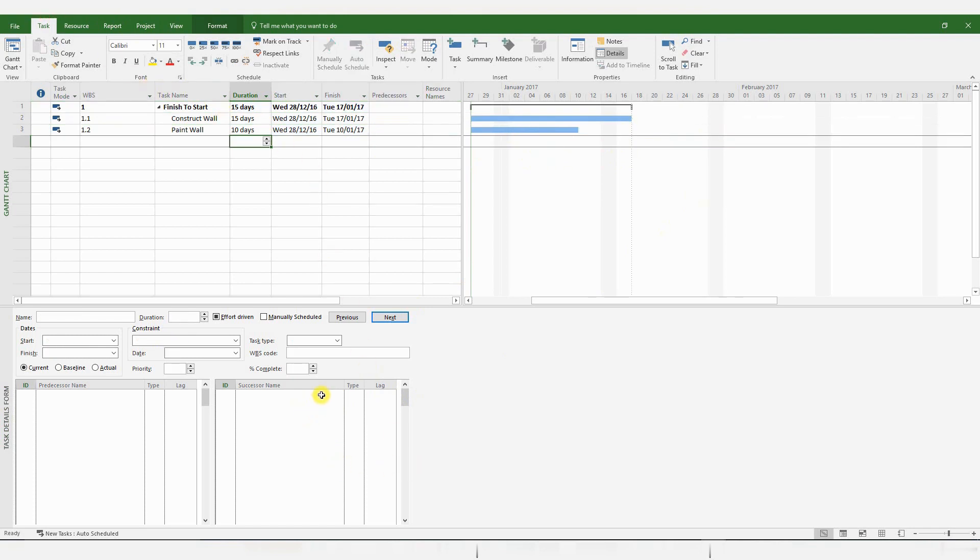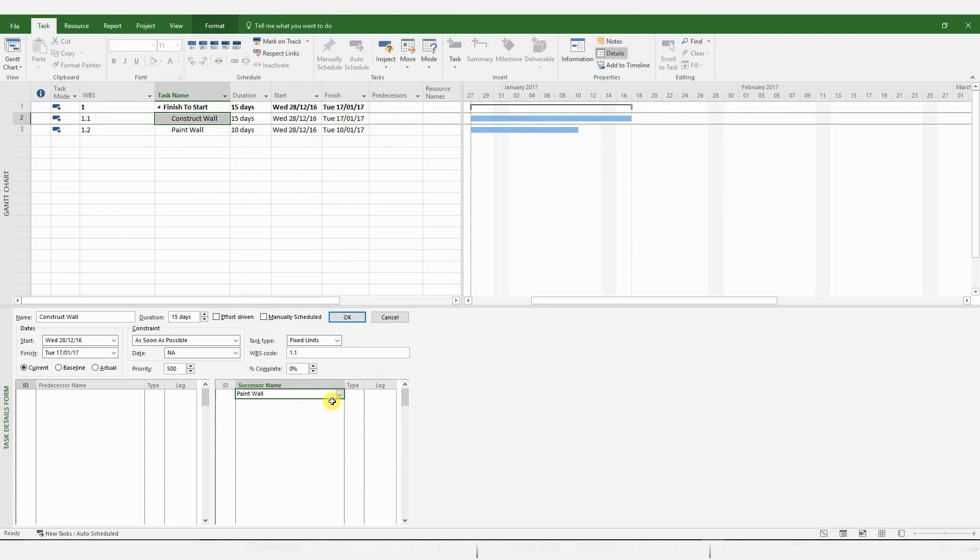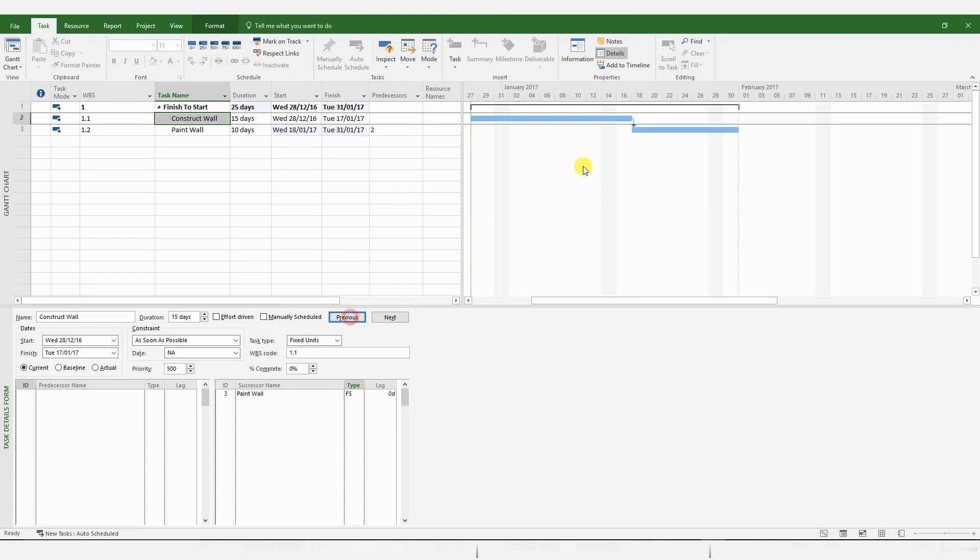Alternatively, you could just pick Construct Wall and pick a successor, which is Paint Wall. Choose a type of relationship, and click OK, and you get a Finish to Start relationship.